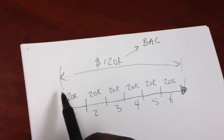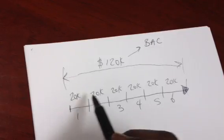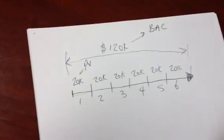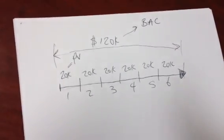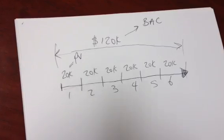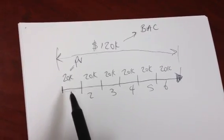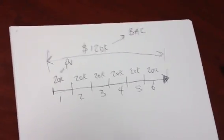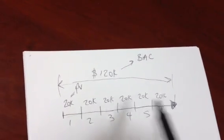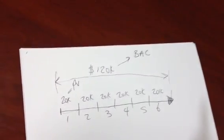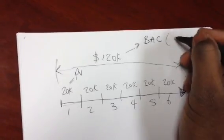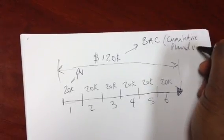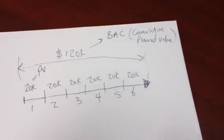Now, what do we refer to this $20,000 every month as? Well, each of these 20Ks, we refer to those as the planned value, PV, for that month. When you think of planned value, you need to think about how much work you're going to get done within a particular amount of time. So, what you're saying by this is in month one, I'm going to get $20,000 worth of work done within that time frame of a month. The same thing for all the others. But if you add all of these up, you get the BAC. So, BAC is also known as your cumulative planned value.